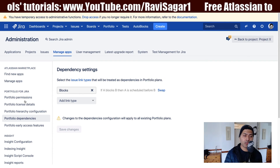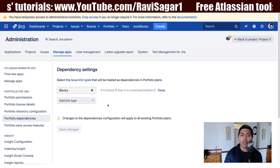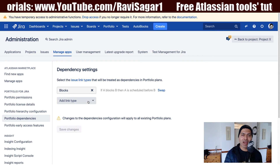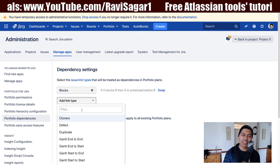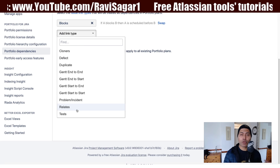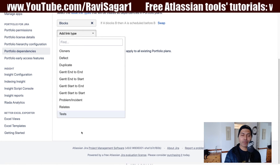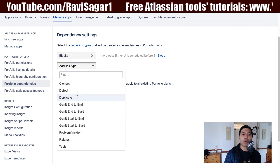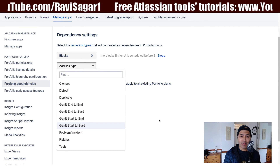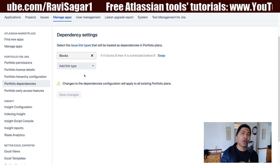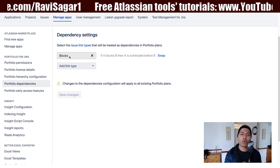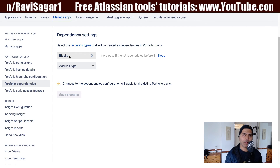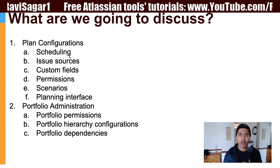The last thing to discuss is the option to configure dependencies. In Jira, we have different types of issue links — for example, duplicate or related — and you can always create your own issue link types. When working with Portfolio, by default it is configured with blocks. But you can add more, like duplicate or related. In cases where you have dependencies and are waiting for something, the blocks link type is quite relevant and suitable, but you have the option to configure your own.